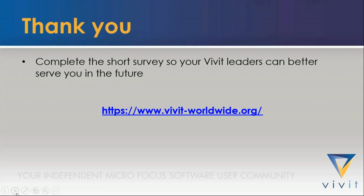So we had 2 BAs, a single solutions architect, 3 country guys, and a trainer. So we had a trainer, 2 BAs, 3 solutions architects, and a project manager. That's our team composition, and that was the core team for the build stage. And when we went live, it was basically the same team plus a few more support staff who were engaging a lot more with the business and so on.